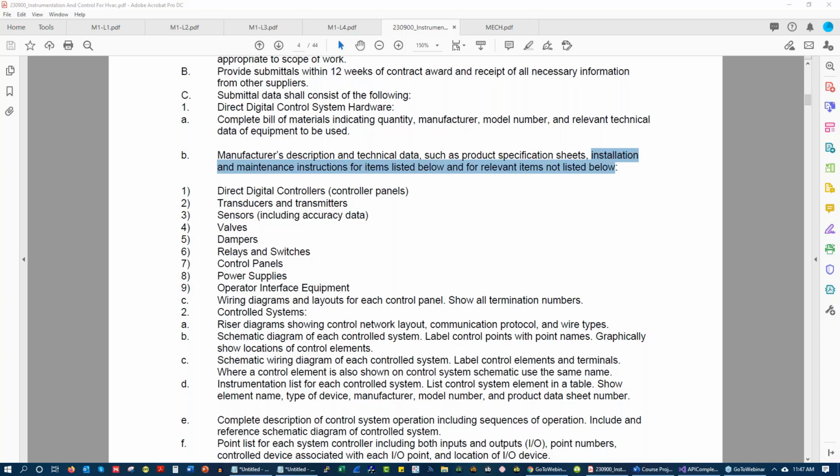We didn't cover SDs, DDs, and CDs. So schematic designs, design development, and then your construction documents, right? As you progress from schematics to construction documents, you are going from, I want a building, to I want this building with this floor, with this room, with this type of wall.